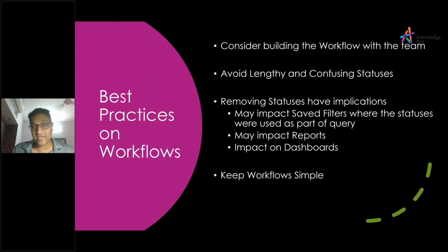Of course, when it comes to workflows, again, please consider building the workflow with your team, right? Because obviously every member in the team has a role to play, so it's always better that you sit with them and create this, right? Don't do it on your own. And of course, don't try to create too many statuses. It just creates a lot of confusion in terms of what's happening here, right? In case you're going to remove statuses as a project admin, it could impact your reports and dashboards. So just be aware of that. Right? Try to keep it as simple as possible.